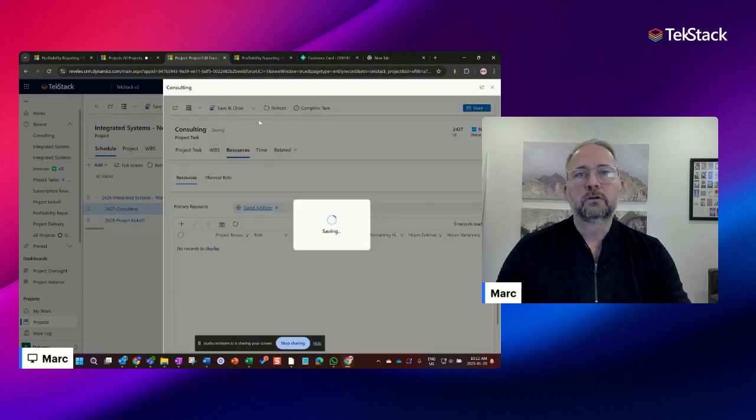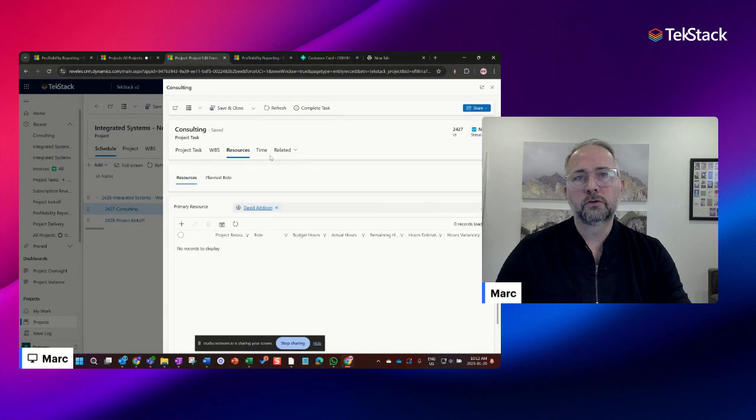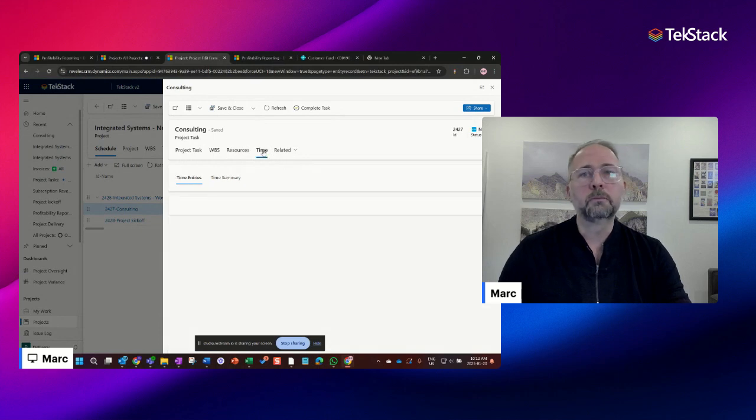And what that's going to do is tell David, hey, I have some work to do. And now David can enter time against that project. We make it a little harder for resources to enter time on projects they're not assigned to. There are exceptions, but generally that is a preferred best practice.